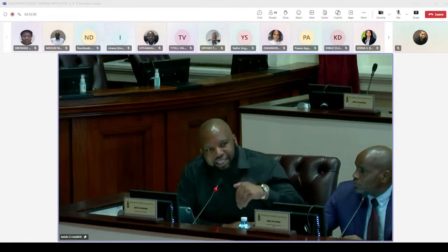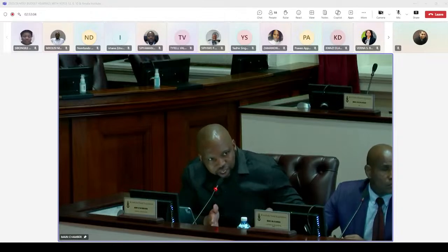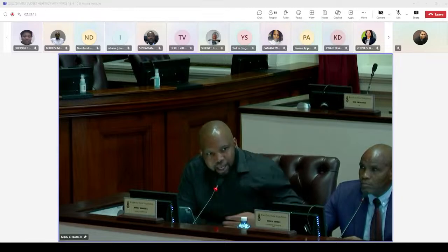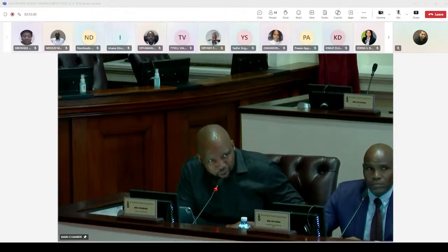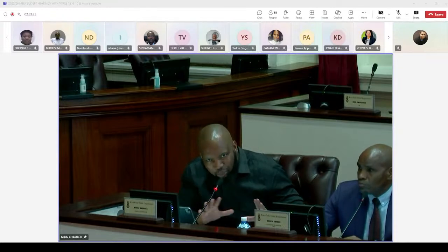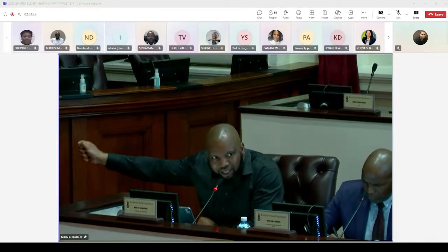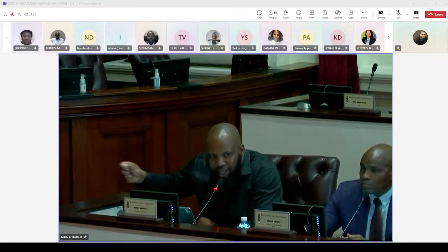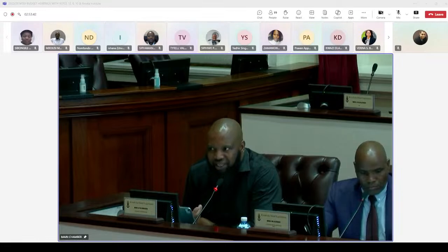You commit to them because the budget exists at that time and allows you to, in 2018-2019 or 2019-2020. In the same year, National Treasury tells you that they cut the budget, and on a multi-year basis you might even lose more. This department probably lost 3.5 billion. This is a very tedious process that you just have to understand. At the time of allocating the project, it was practical that we could build 1,000 units. The current reality of what has been allocated to us is that we can probably only build 300.